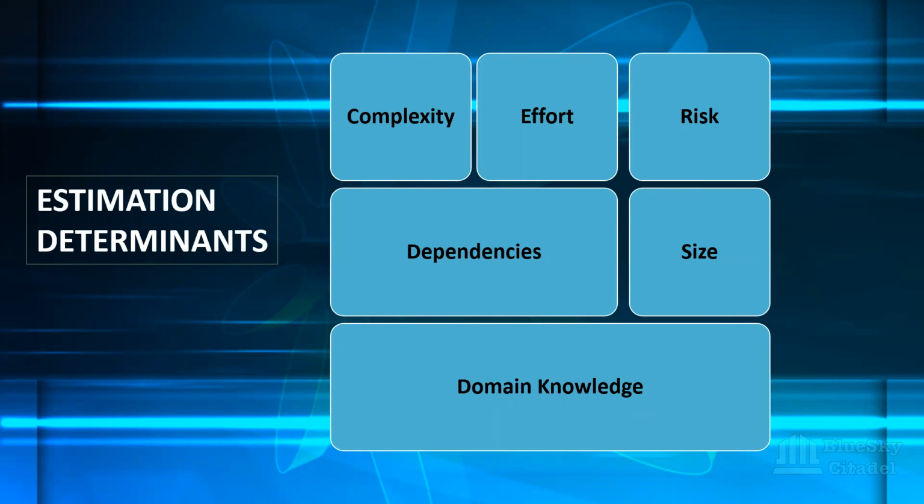Sure, she has the domain knowledge. She has some knowledge about how the system of the organization works and all that, even though when it comes to her overall experience as a developer, she just had 8 years. However, Daniel is coming in with his 15 years experience as a developer. He's just coming into the organization. So he still needs to learn their domain knowledge, have a knowledge of how their system works, how things work and all that, and that would affect his estimation.